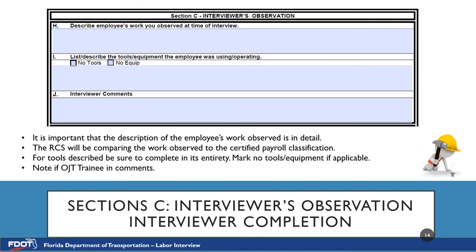Section C is the Interviewer's Observation. Letter H: Describe the employee's work you observed at time of interview. This is the focal point of the labor interview — it is imperative that the employee's activities are documented accurately and in detail. It is also important to note if an employee is just assisting in a task as opposed to being a journeyman or completely independent. Letter I: List and describe the tools and equipment the employee was using or operating. Mark no tools and no equipment if neither was used, but be aware that this must match up with the observation. Information noted in items H and I must coincide and be as detailed as possible in order for the RCS to determine the correct classification for the employee.